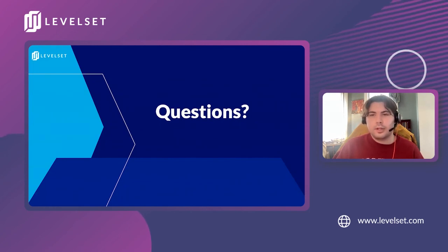All right, well, it looks like we don't have any more questions, so I'm going to go ahead and end the webinar now. Or actually, so Peter, you're asking about the mechanics lien? Typically with the mechanics lien, there is going to be a required mailing format associated with the delivery of a mechanics lien. I believe just like the California preliminary notice in general, the two types of delivery that are acceptable are certified mail with return receipt or in-person delivery.